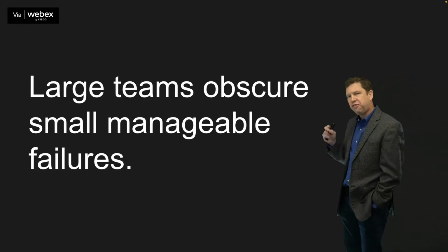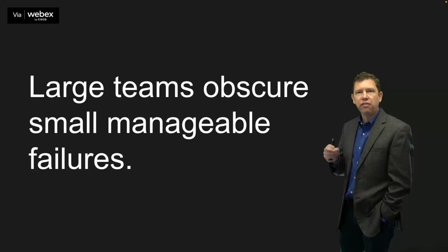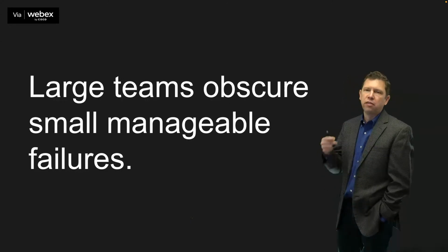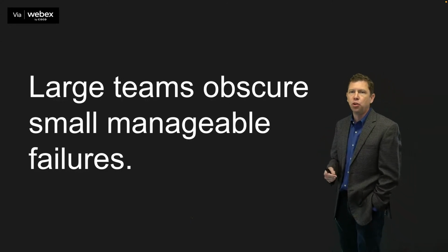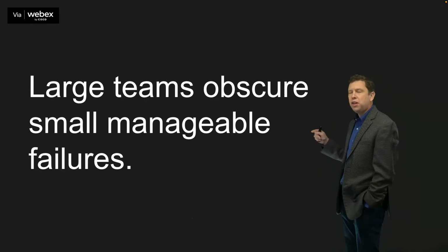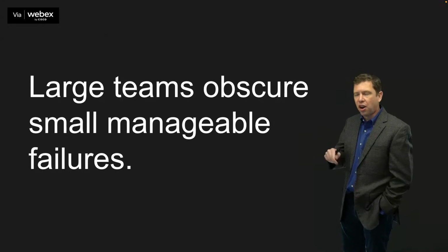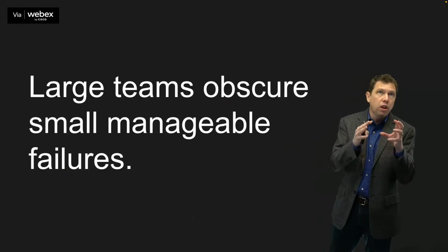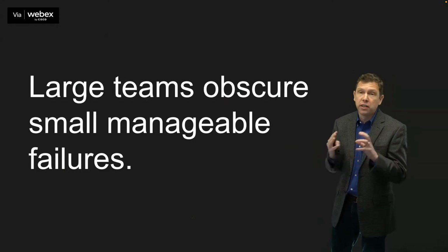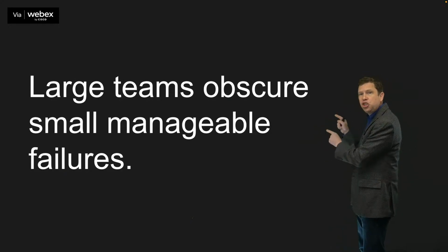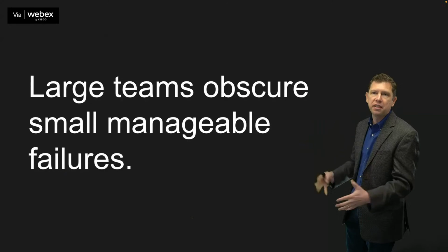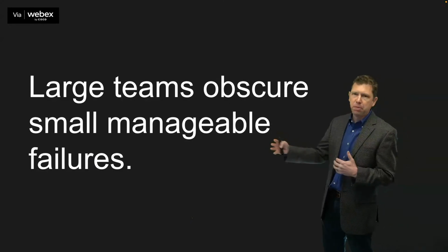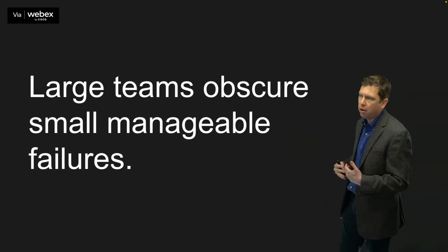If you're doing something with 5 people, it's a lot easier to tell if they're making progress or not. If you are unable to deliver something on a regular basis, iteratively, and show progress and show that you're being efficient with 5 people, scaling that up to 50 people is going to make it a lot harder to see the failure that's there. And this is one of the reasons that it's really easy to try to scale teams up before it's helpful to them or when it's not helpful to them, because it makes the thing that's showing failure go away because you now obscure it and you can't see it because you've got so much going on. And so it gives you reasons: oh, well, it'll take us a while to get up to speed because we've got 50 people now, so now we need a year to get up to speed on stuff.